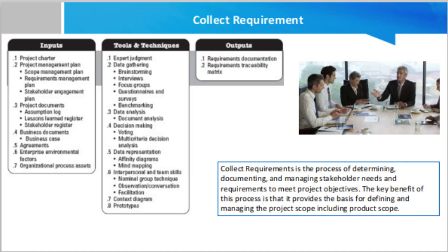Each requirement should be SMART, meaning specific, measurable, achievable, realistic, and time bound. Always validate assumptions with the stakeholders and make them concrete and certain. Make sure all stakeholders are on the same page in terms of understanding the requirements. Requirements must be signed off by the customer side stakeholders who have the authority to approve and sign off.